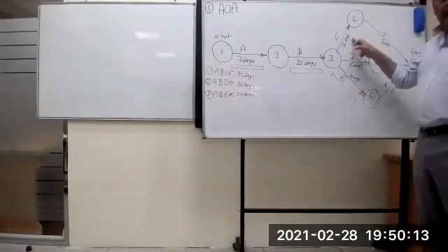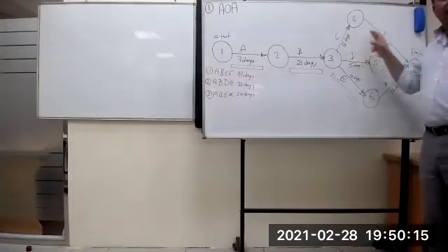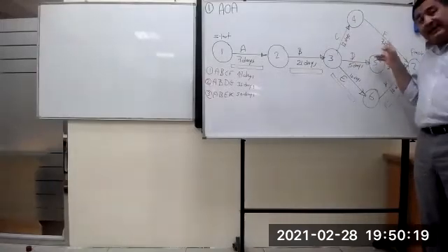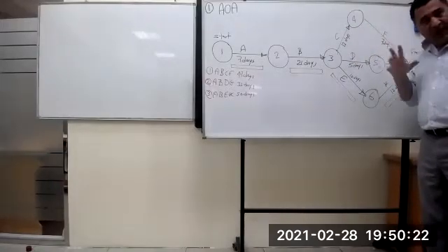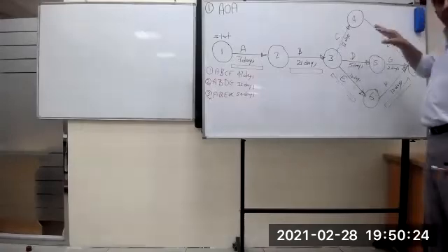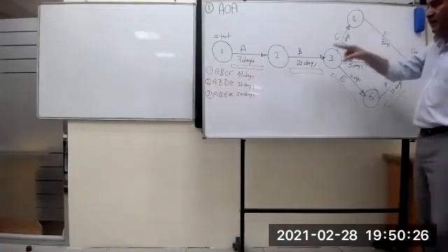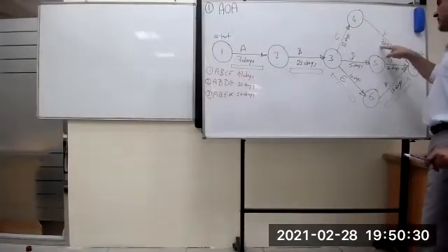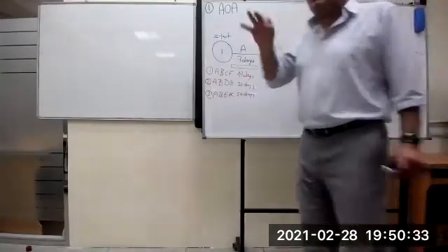Can delay 1 day? Yes, 1 day. Maybe this 2 days, or this 3 days, and then this might become critical. Assume the total duration for this path is 47. This activity can delay 3 days and this activity 3 days, but not both of them together, no.